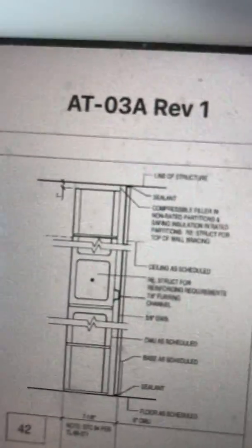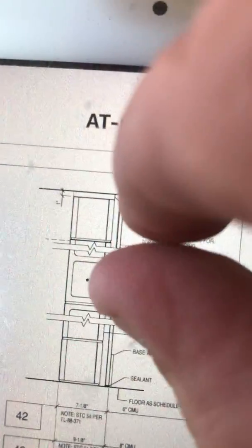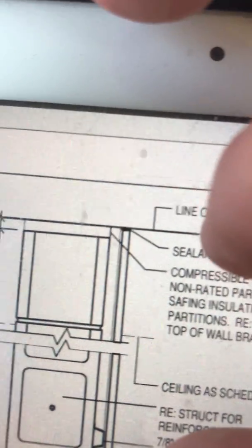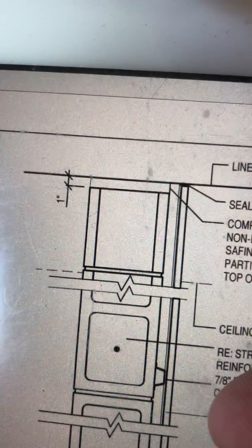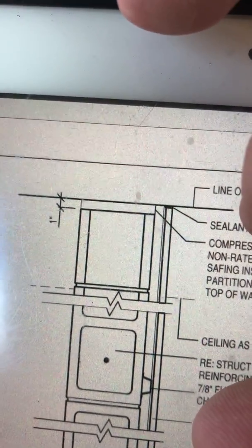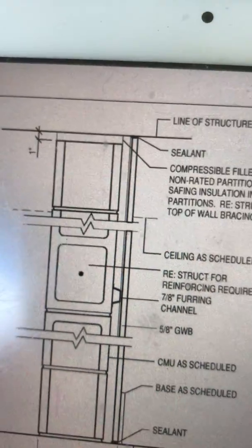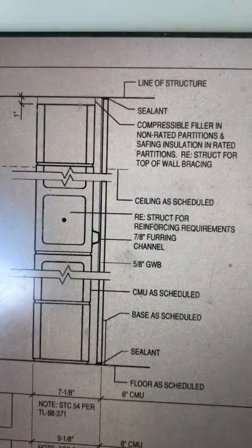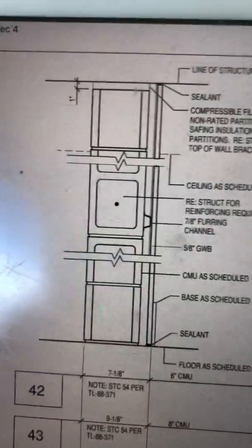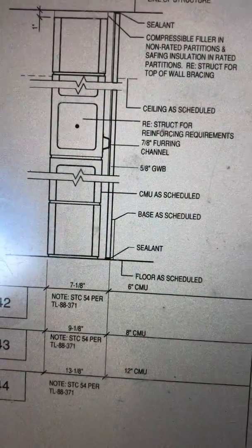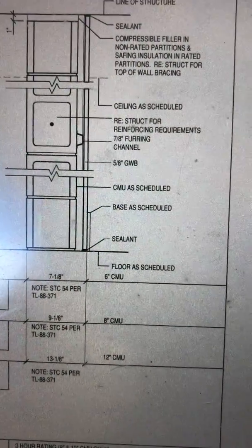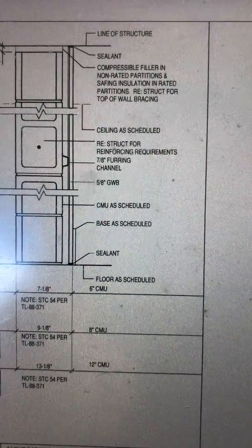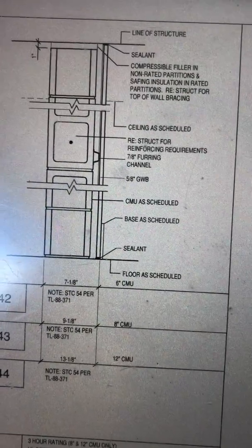When you top these walls out, it's showing at the top an inch joint, a caulk joint. That lets you know something. And if you want to know how far it comes off your columns, you go to your structurals and look under CMU Details. But you need to go all over your structural and all over your architect drawings, looking for anything to do with masonry.